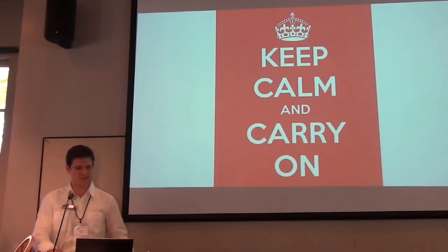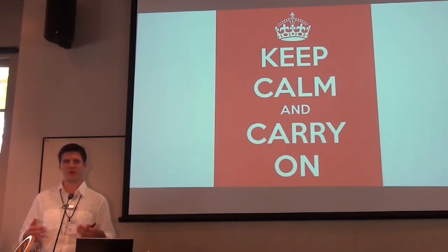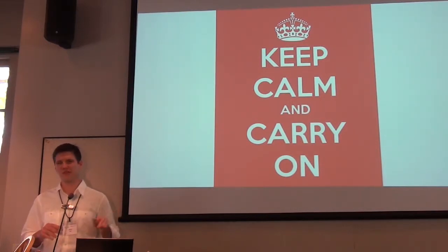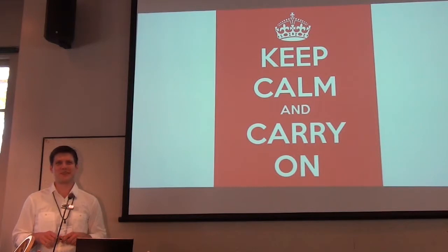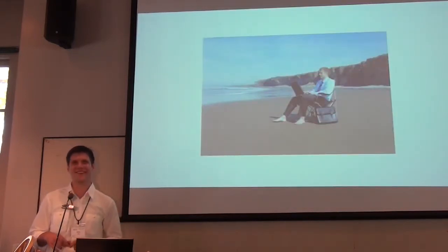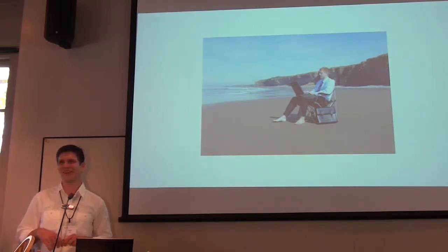So we worked on that, and while working on it, one of the things that we didn't even bother to implement at that point were game menus. We were like, well, we're professional. Game menus are easy. It's going to take 2 days. Turns out it took 2 weeks because of technical issues. So these were my holidays, not happy holidays. I was essentially supposed to be on vacation, but coding the whole time, trying to go around things and so on.